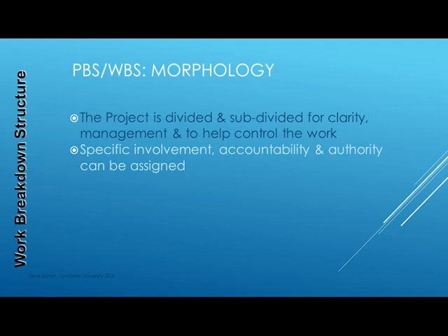Sometimes more informal agreements, perhaps between the project manager and individuals, will be established. These agreements should establish specific accountability and authority, as well as setting quality expectations, deadlines and costs or budget transfers that will constrain the delegated work. Development of accurate estimates will be enhanced by the involvement of experts and those people who will do the work.